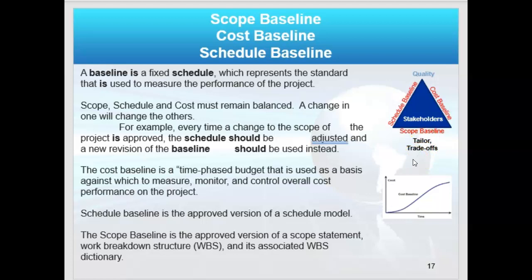If I change the schedule, say I lengthen it, I'm going to need more cost. And I probably lengthened it based on new scope. If I cut scope, I can cut schedule. That's going to cut costs, right? But what have I done to, notice at the top, not really part of a triangle, but always considered, what have I done to quality, right? And always doing this with an approved change board, which some of your key stakeholders will sit on.